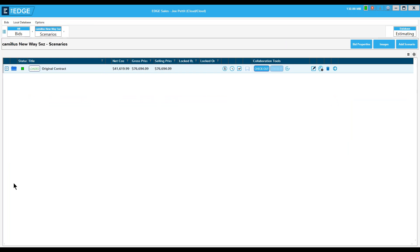Here I have a completed job. Once I set this job up for change orders, the original bid becomes permanently checked in — the only way to make changes to it will be through change orders. Each change order can have the same or different markups, wages, prices, or productions from the original bid. This new way requires using the cloud for your bids, since the change orders will become part of the original contract scenario. I recommend copying the original contract first in case you ever need to see what the job was before any changes were added.